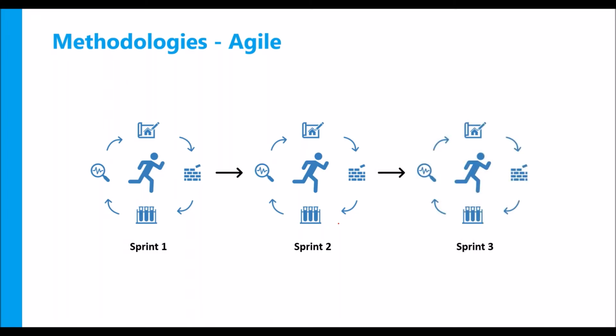You have something called iterations or sprints, and instead of delivering everything in a single go, you will take pieces of the requirement and you start delivering them time box by time box. Each sprint can be 2 weeks to 1 month long. That's a recommendation. Which means that the customer can start seeing value out of his proposal right from 2 weeks of requirement gathering. So this is at a very high level, a 10,000 foot bird's eye view of the difference between waterfall and agile.